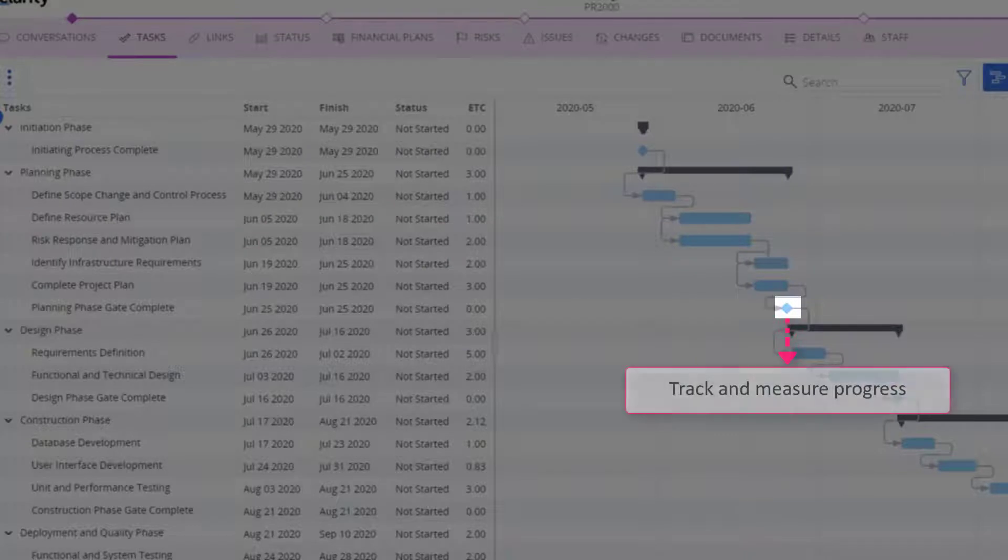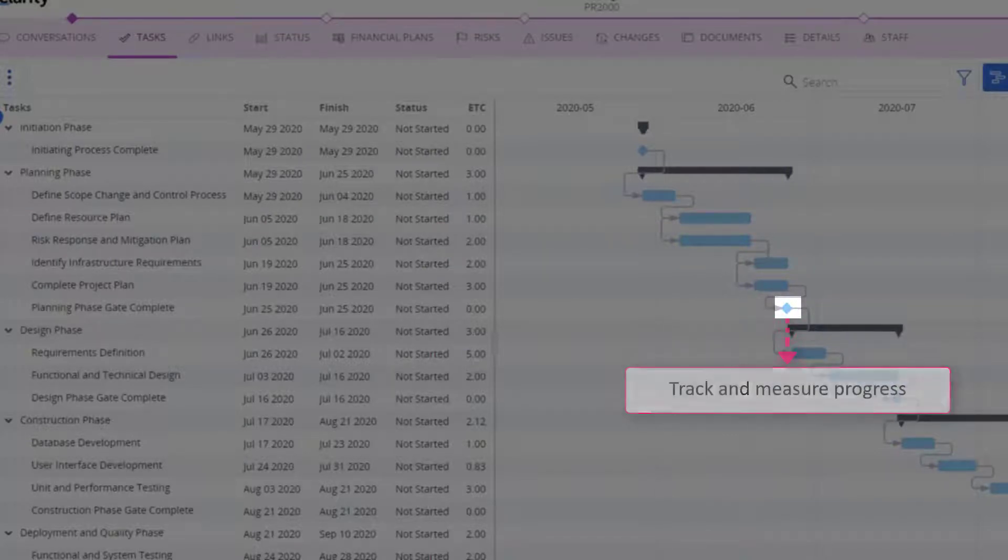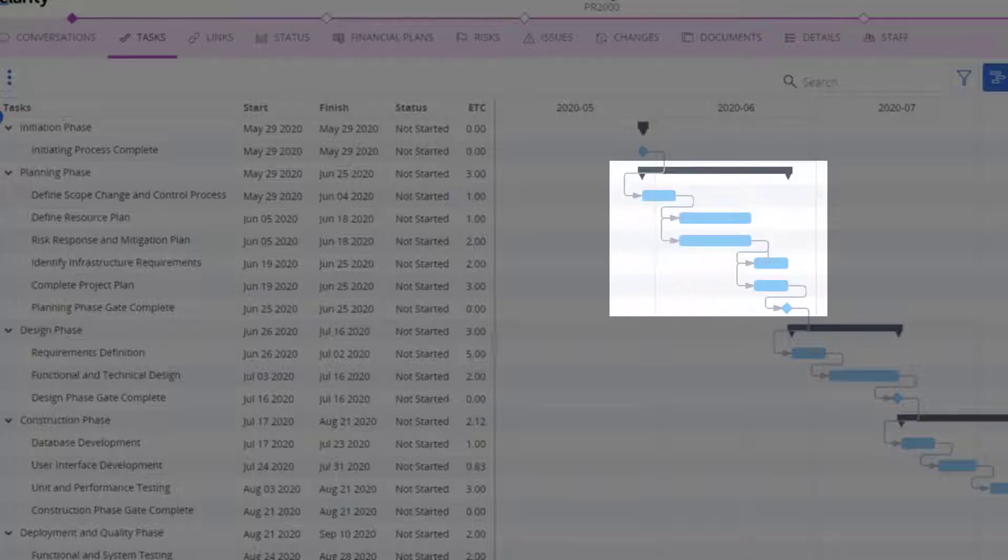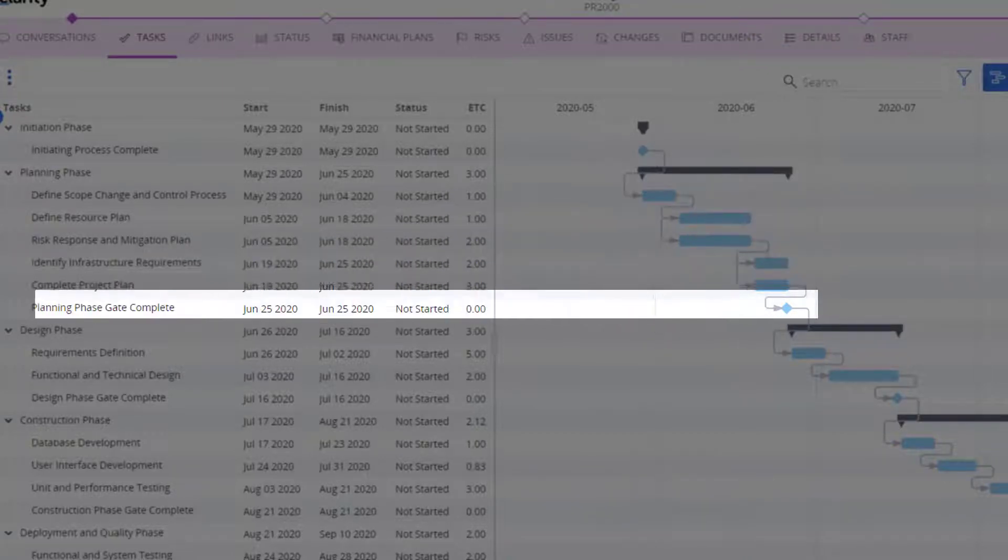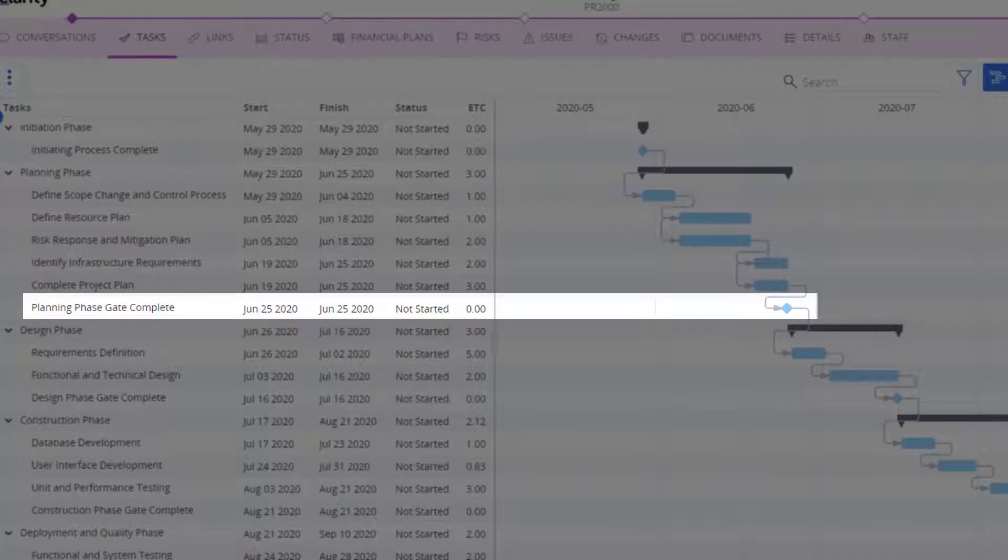Milestones help you track and measure progress. The milestone is complete only when all the tasks in the planning phase are completed. In this example, planning gate complete is a milestone.